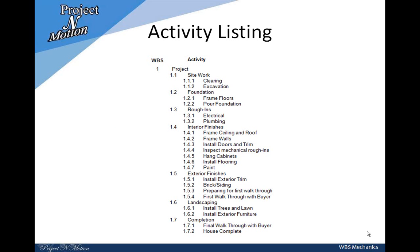As we have gone through all the description of WBS and its graphical representation, it is time to disclose some bad news: Microsoft Project does not support the schematic graphical representation of WBS. To work with WBS in Microsoft Project, we need to flatten the graphical structure into an activity listing as shown in this slide. It does not involve any rocket science — it is simply transformed into a list. The different levels of WBS structure are handled by different indents in the activity listing, and this activity listing is ready to be imported into Microsoft Project without any further modifications.